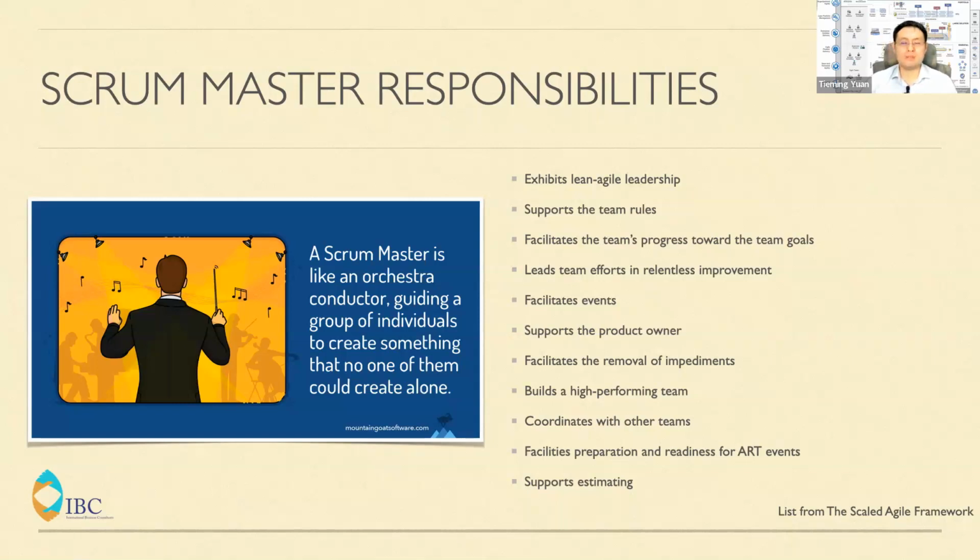Team B needs to depend on Team C to complete certain tasks. So can the Scrum Masters sit down together and decide which user stories or features or epics to put in the first sprint, so that we get the dependencies out of the way, so that once we finish this sprint, Team B can start to work on the next stage.